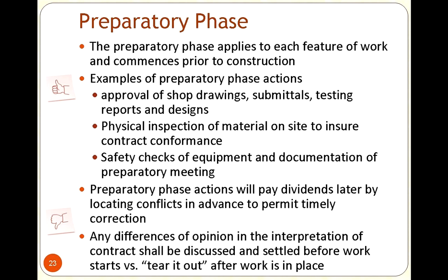Essentially, what we did in this phase was, before you drive the first nail or unplug the first item or slap down whatever it is you need to slap down in that project, we want to make sure everything is fine. Are there any drawings we need to review? Are there any testing reports we were talking about earlier? Any things that we had to do in that job?